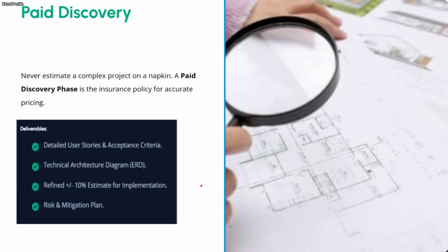Secondly, a paid discovery will help you as security for your actual project, because if the client is going to pay for your discovery or requirement gathering sessions, all the right stakeholders will come in for those sessions. They will list out all the requirements that they want, which will help you estimate the final budget for the implementation or integration cost. So that's where it becomes important that you do a paid discovery and then arrive at an accurate price for the setup or implementation.